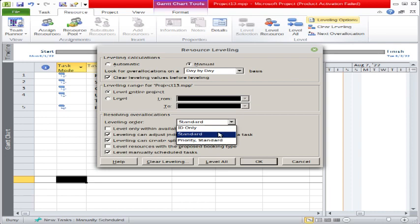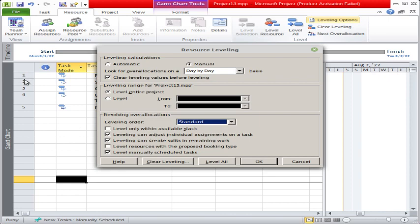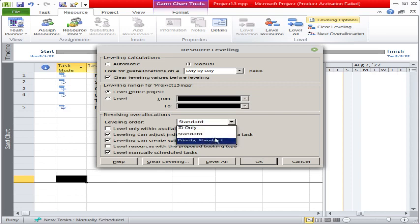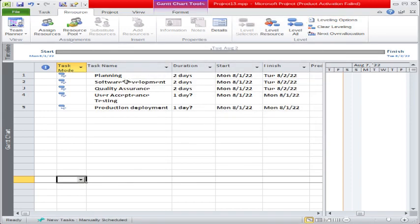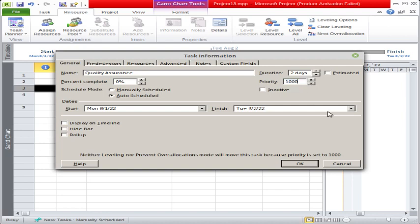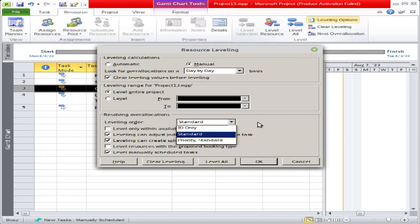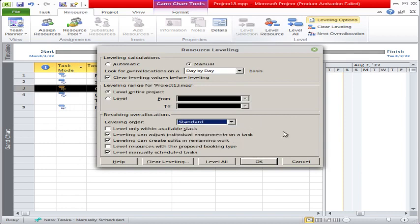Then there are labeling order options: Standard, ID, and Priority. Standard is the default option. ID means the task IDs (1, 2, 3, 4) — the software will level based on task ID. Priority is set on the task itself; if you click on a task you will see the priority option. For example, if you set the priority to 1000 it becomes the highest priority, and the software will level resources based on that higher priority.